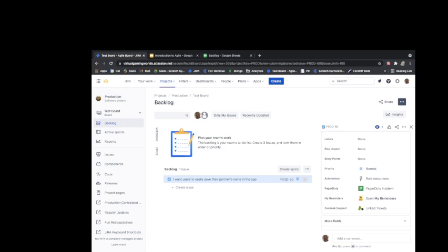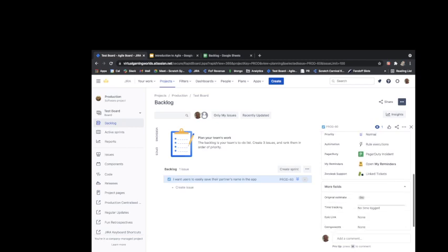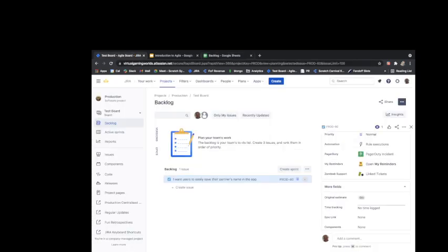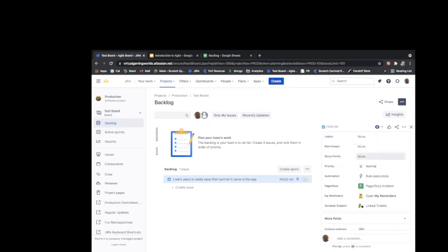So we're going to sit down with the team or the person who's actually going to execute that task. And this person is going to tell us, for example, that this is a small cost. Therefore, we're going to give it a 2. Let's say a 2 out of 10, just to keep it simple for now. So here in story points, I'm going to click on this field right here, and I'm going to type 2, and I'm going to validate that 2.